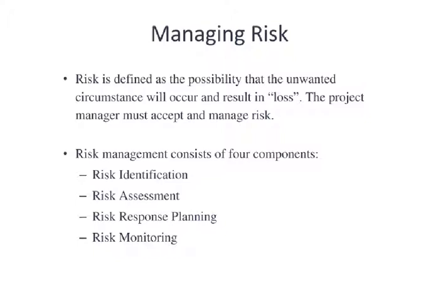Once you have the risks identified and the risks assessed from a probability and severity point of view, then there needs to be a plan that will be initiated at a particular point. Once indicators happen as to this unforeseen event is actually likely to now occur because we're seeing certain pieces of evidence appear, we need to have a plan in place to act.